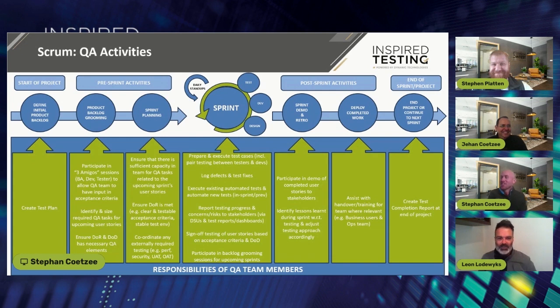No problem. So again, it feels like there are two schools of thought with automation, which is either in sprint automation: we finish everything in a sprint, and a story is not considered to be done until there's automation coverage. That's obviously for companies that adopt automation and have an automation first focus maybe. And then there's, we're going to do all the manual testing in this sprint and we'll do the automation the next sprint.